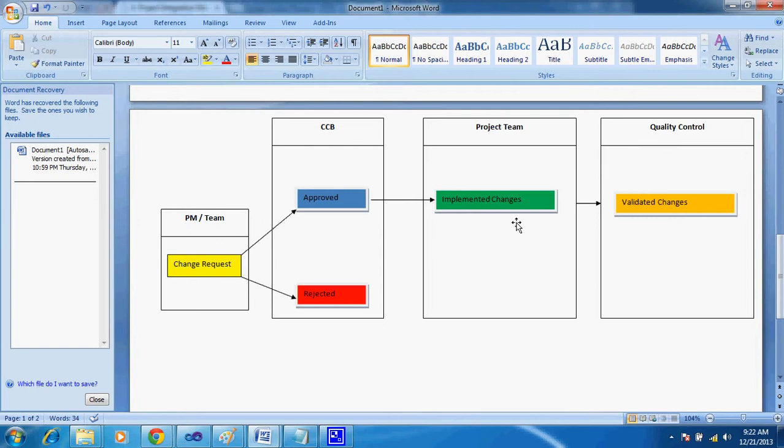When you say deliverables, it can be an end product or a phase-wise deliverable. For example, you might be in the design phase, and the deliverable can be a high level design document, which might not be the actual end product that could go to the customer in the project life cycle, but still it's a deliverable for that particular phase.